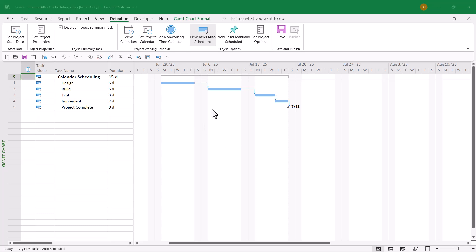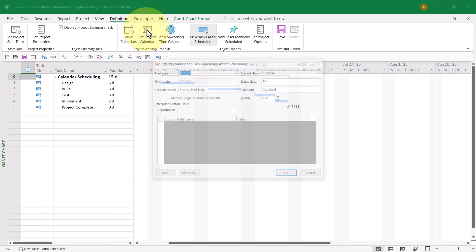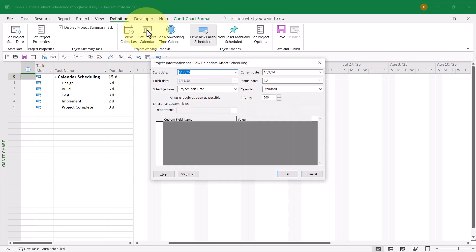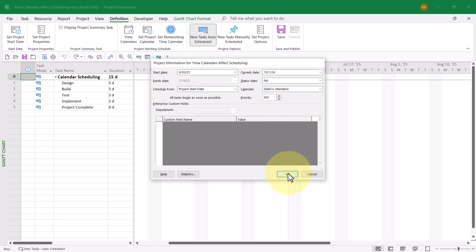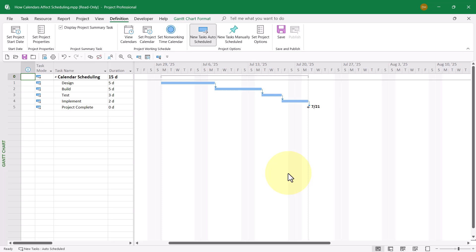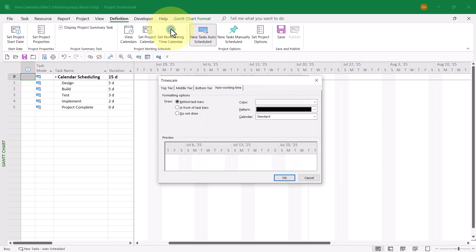Now, in order to set this calendar, I need to click the Set Project Calendar button to display the Project Information dialog. On the right, I'll click the Calendar Pick List button and choose Dale Co. Standard, then click OK. But that's not enough — I also need to click the Set Non-Working Time Calendar button and choose exactly the same calendar in that dialog.